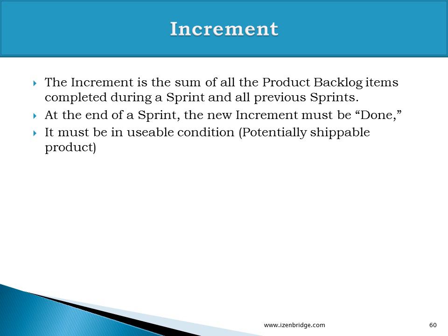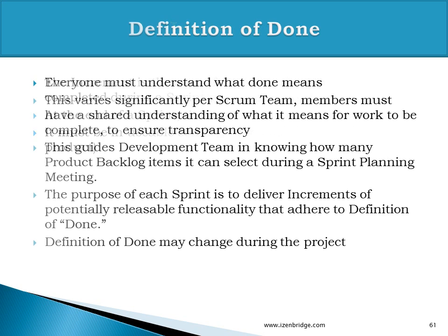The product owner may not ship it, but if he wishes, he can give that increment directly to the end users. What signifies it? The increment should have all the database migration scripts, all the installation scripts, everything in it. It should be taken as a deployable increment.